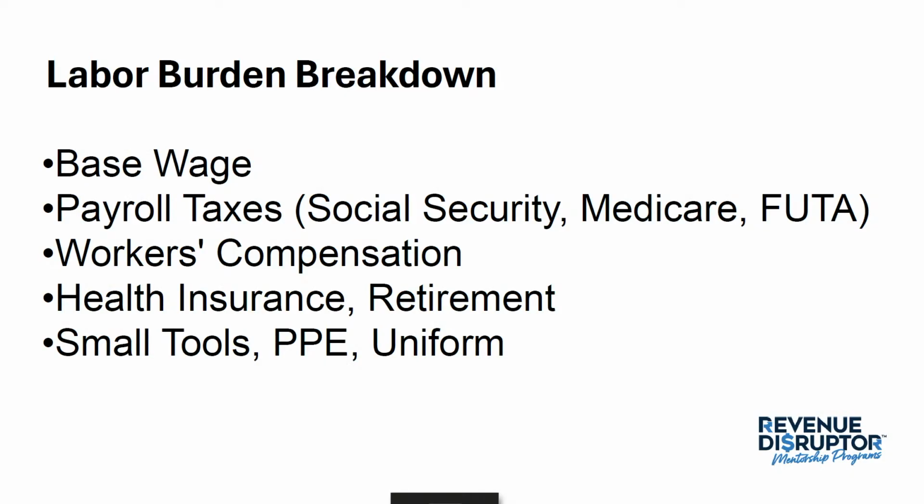And so maybe if you're purchasing all these types of things for your employees, that's a cost you are incurring, right? Maybe you want to find a way to get that cost back, so you would add that to their overall pay. You come up with a rate so you're recouping those costs as you're charging your clients. So maybe small tools, PPE, personal protection equipment, their uniform.